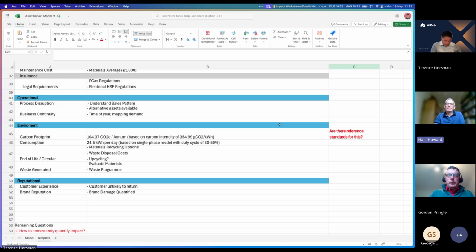Most of the larger contracts and frameworks now are just asking for a commitment, normally up to a maximum of 5% of fee as a carbon offset, and then the delivery chain puts that as a final submission, either as a period return, annual return, or at the end of the project, so that the client can then confirm what their carbon offset has been throughout the project.